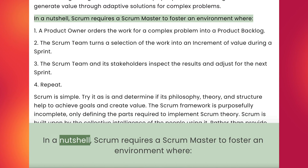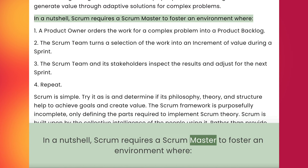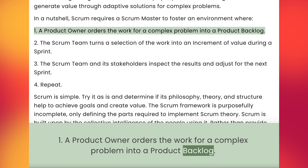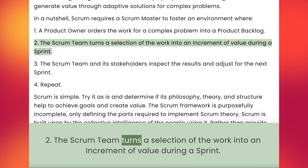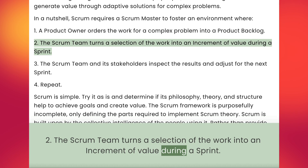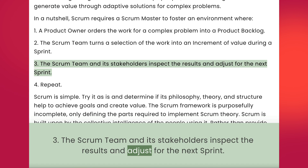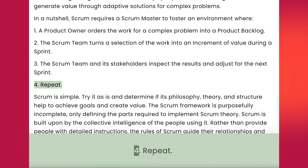In a nutshell, Scrum requires a Scrum Master to foster an environment where: one, a product owner orders the work for a complex problem into a product backlog; two, the Scrum team turns a selection of the work into an increment of value during a sprint; three, the Scrum team and its stakeholders inspect the results and adjust for the next sprint; four, repeat.